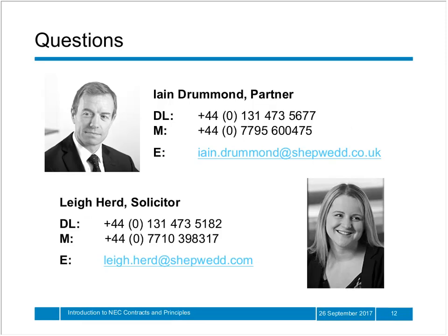Okay, so just before we finish up, we have one question which goes back to the requirement to act in the spirit of mutual trust and cooperation. And the question is what effect that has in the contract. This is something that we'll probably cover in our 3rd webinar, but generally speaking, that principle, which is stated at the outset of all NEC contracts, is simply a principle, and it's not been taken by the courts to be enforceable.